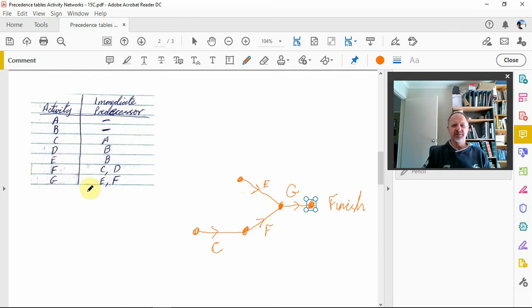Now this is where the interesting bit occurs. I'll come back to the D, because the interesting bit is here: before E happens, B's got to happen. And before D happens, B's got to happen. So D happens before F, but after B. Now our line of B connects to here. So D occurs before F, but after B, so that's got to go down here.